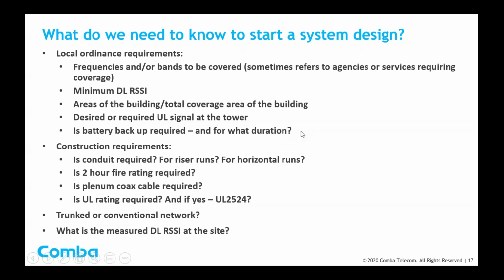We've seen ordinances say we want it to run for 2 hours if the AC goes out. We've seen other ordinances say we want it to be 24 hours. So again, these are all the things you need to know from a local ordinance perspective, and then also the construction requirements. Is conduit required? Is it required for the riser run coax only? Is it required also for the horizontal coax runs? You need to know that.